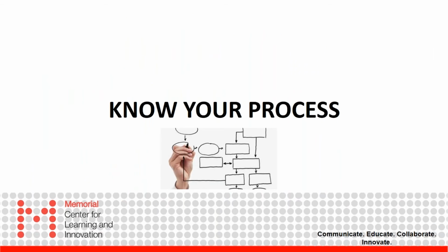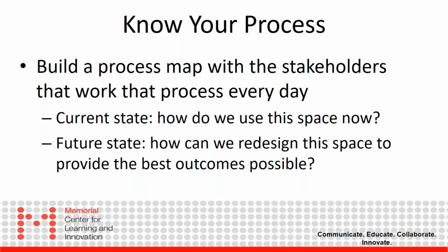Next, we want to make sure we know our process. I function as a Lean Six Sigma project manager, so I process map on a very regular basis, and I found that that is very translatable to building these models. It is very much a value-added step to sit down, bring people together in a room, and build out an actual process map with the stakeholders that work that process every day.